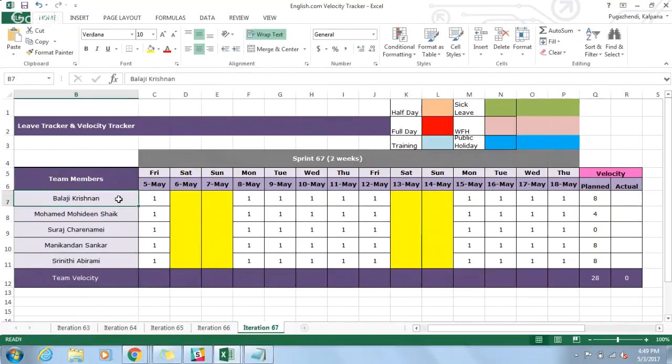And we have Balaji and Srinidhi as developers and Sheikh as shared UI developer. Mani will be the QA for sprint 67, with no planned holidays and no public holidays in the sprint. Velocity of 28 for the sprint. So per developer it would be 8 points, Gemma.